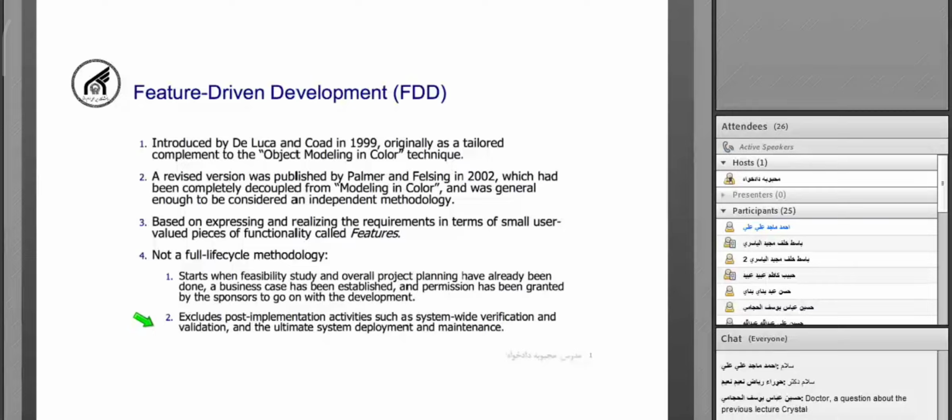If you estimate the number of people that are involved are going to be something between 15 to, for example, 25, then you should deploy the Crystal Orange. Okay, so it's only the number of people that are involved, not just developers, all the people that are involved, all the stakeholders. And who will determine that? I think the project manager should determine that.